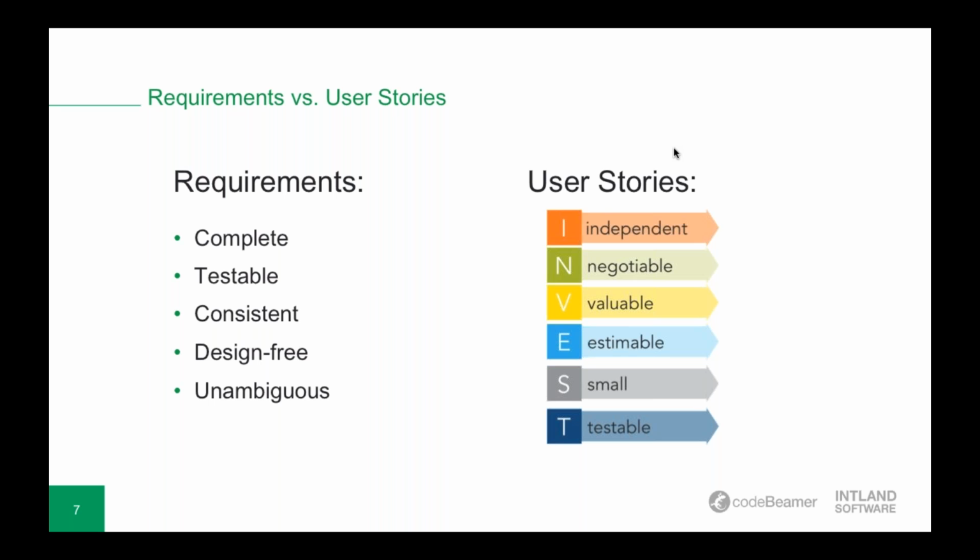A good user story uses the INVEST model, which stands for independent, making it easier to plan; negotiable, allowing details to be added during the collaboration; valuable, providing value for the customer; estimable, so not too vague; small, meaning it can be done in about a week or less by the team; and testable, having a good acceptance criteria. So the acceptance criteria are used to determine whether the user story has met the goal or the need of the user.